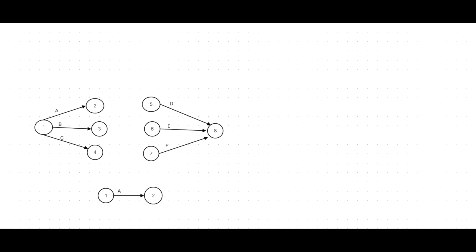But remember, that's very important. Assume we are going to start from event number 1 more than one activity. Just assume 2 activities, A and B. We are going to start from event number 1. That's correct, it's possible to start. But the problem is, remember, you can't complete both using another same event. That's very important. You can't complete both using another same event. That is totally wrong.